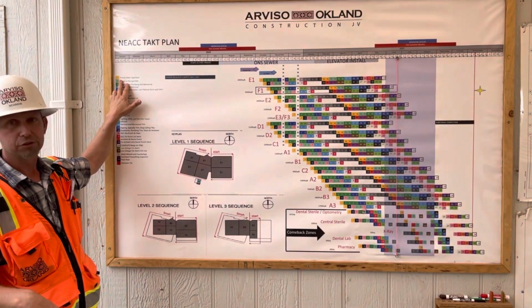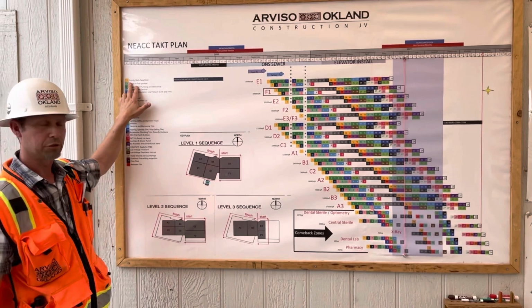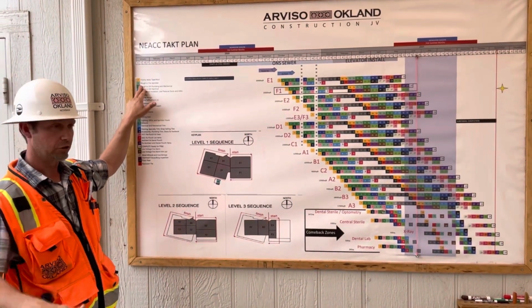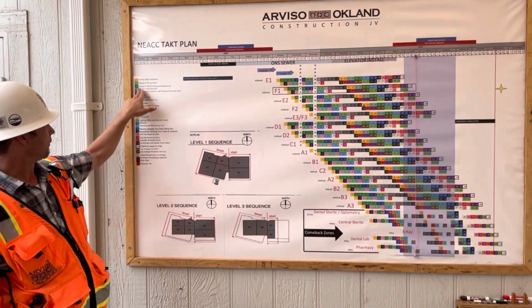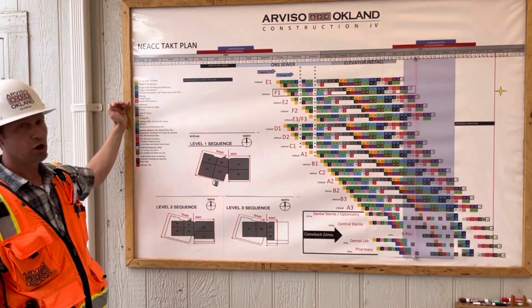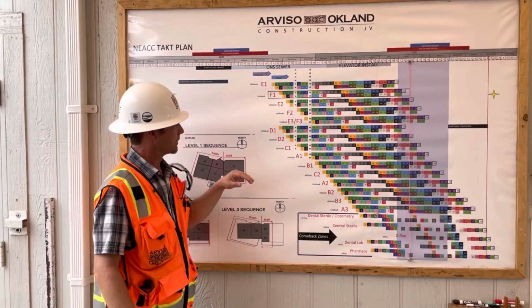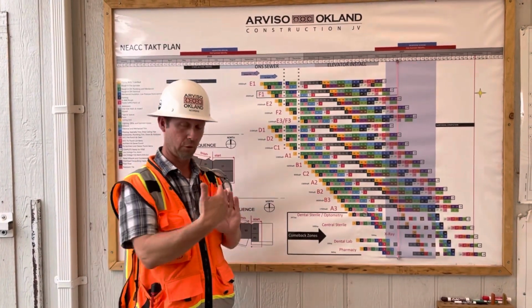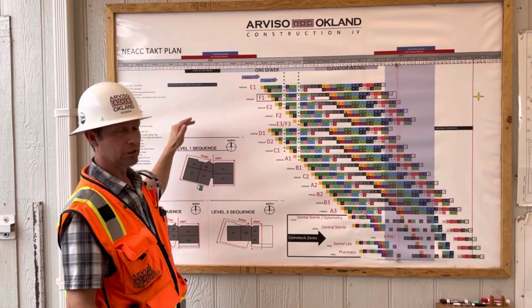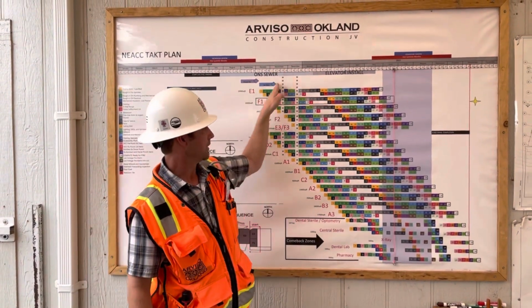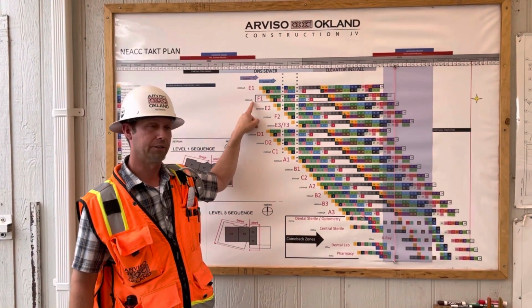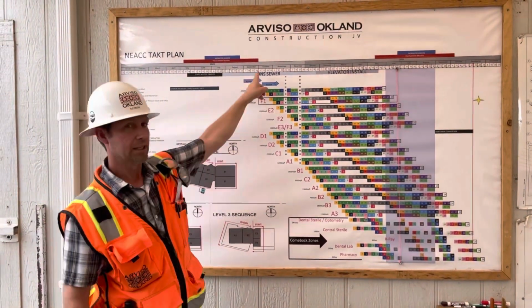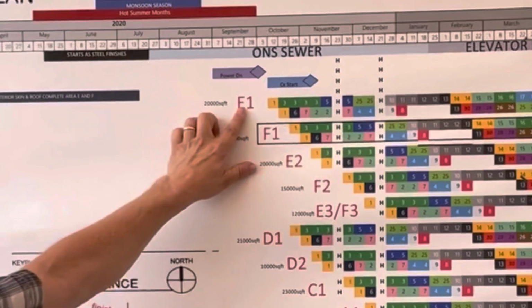When you're first going into a section of rough-in, the first thing you do is your priority walls and tape. You do your rough-in fire sprinkler for all your high items that go in, rough-in plumbing, electrical, and so on, all the way down through. And then those numbers correlate into the space here. Real simple from a graph system of your legend with your dates, and then you're doing those items by area. So just a kind of overview: legend, calendar, and then here we put the areas.